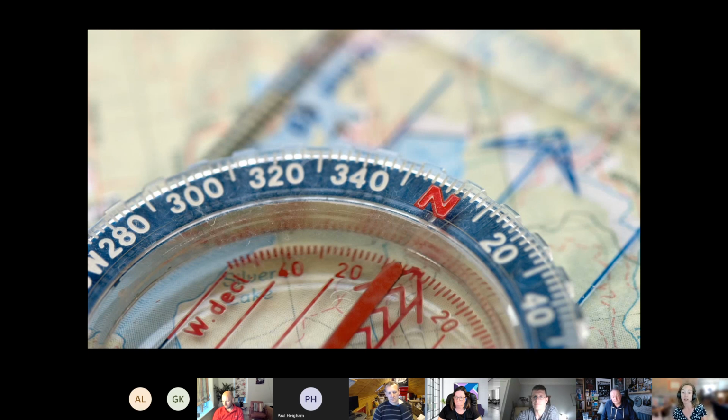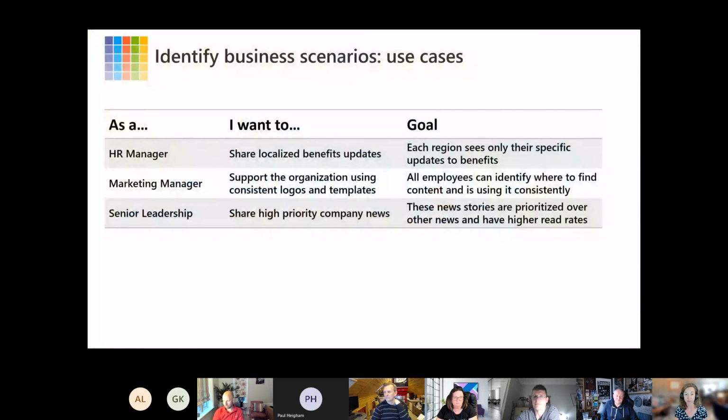That's not necessarily the primary objective in your scope. So it also gives you some data to hold up against changing requirements as you're working on them and really being aligned on what is actually the most important that the business has already agreed on. So when you're outlining these top tasks, don't forget to include the varying audiences like managers, leadership, and the content owners themselves, because supporting your content owners' needs ensures they have no friction updating their content areas and it stays valuable as a resource for the whole organization.